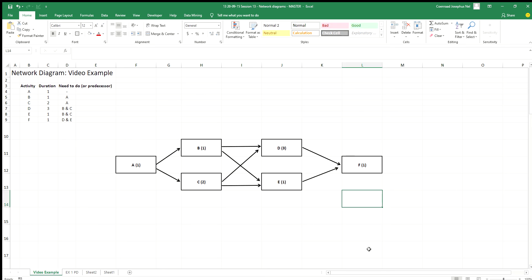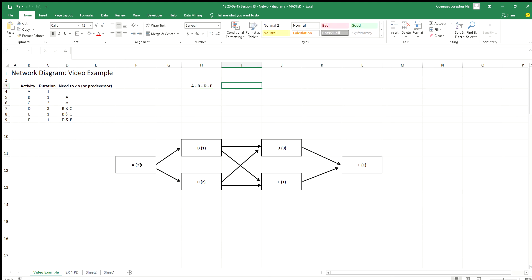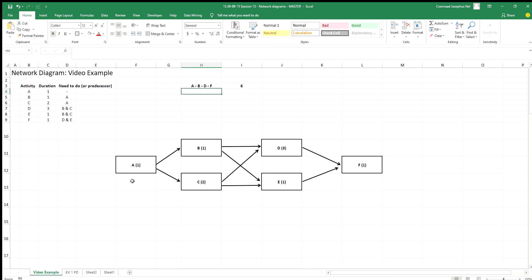Step one is complete — I've got the diagram. Step two is to figure out the longest route through this project. Let's look at how many routes there are: there's one route going this way, one going this way, and one going that way — three routes total. The first route is A, B, D, and F. The durations are: A is 1 + B is 1 + D is 3 + F is 1, giving a total duration of 6.